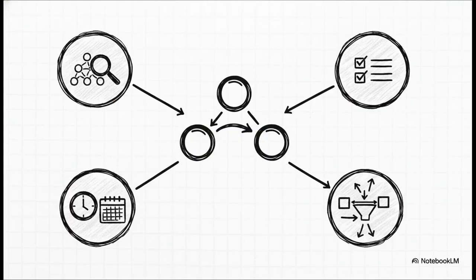And this is where its power really shines. This diagram forces you and your team to sit down and list out every single activity. It makes you figure out the exact order of things. I mean, you can't have users test a feature that isn't even coded yet, right? So with this visual map, you can suddenly see which tasks are critical, spot bottlenecks before they wreck your schedule, and build a timeline that's actually based in reality. It literally turns you from a reactive firefighter into a proactive strategist.